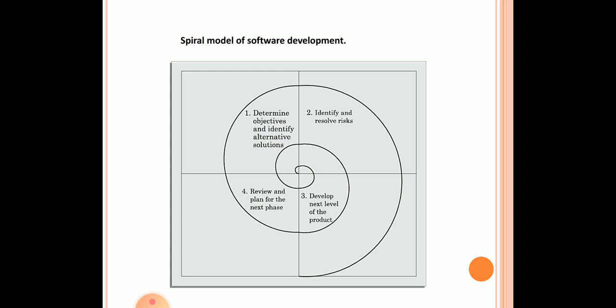So we can at any point of time measure the cost and how the software development process has progressed so far, up to the current phase. In the spiral model of development, the project manager dynamically determines the number of phases as the project progresses. It is not determined before the starting of the development process. At each phase, the project development team or the project manager can take a decision on how many loops will be needed to complete the software.